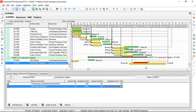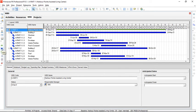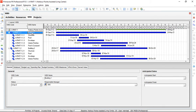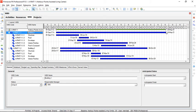So this is the best approach for project crashing. You can also open the WBS tab of the project and have an overview of different phases of the project. As you can see now, building one is controlling the whole duration of the activity. So maybe in the next step, we can select one critical activity from that phase and reduce the duration in order to crash the whole project.